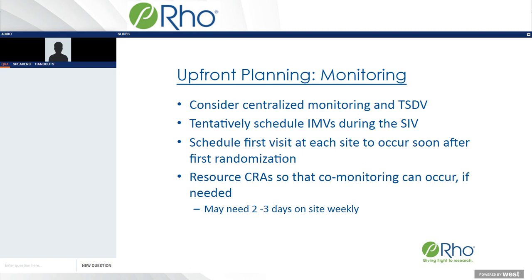If you do a targeted or reduced SDV approach, this will allow you to get through the monitoring portion of your study and keep pace with the enrollment for your study. So usually centralized monitoring and reduced SDV or targeted SDV go hand in hand. So it's certainly a consideration to make. It will decrease the resources that are needed for monitoring because you'll have fewer on-site visits, or at least you'll need fewer days overall on site.